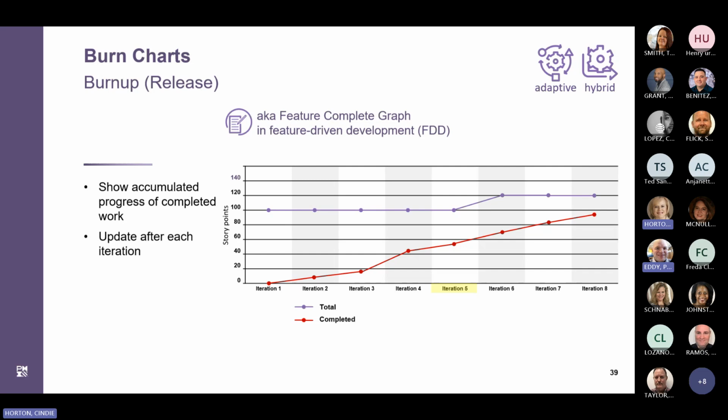A few reminders to keep in mind. You want to create a baseline for the burn-down only after estimating the full value of the release backlog. And according to lean principles, decide as late as possible on the stories to be included in each iteration and which are therefore included in the release.